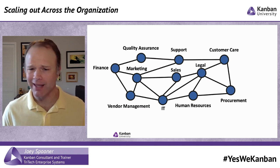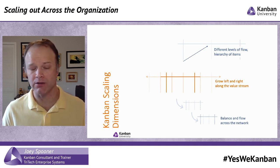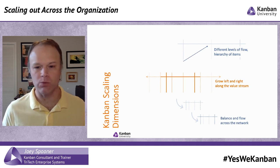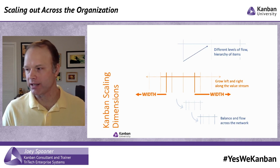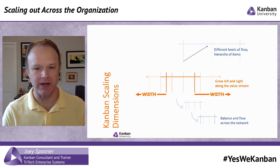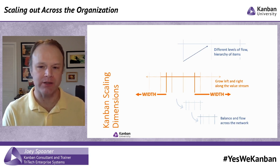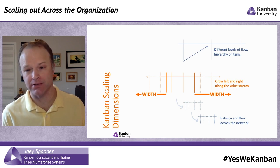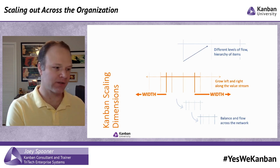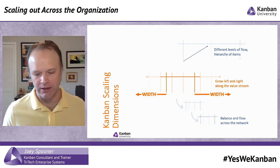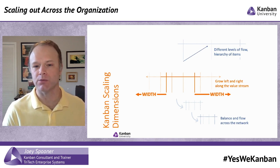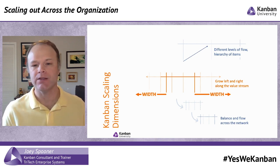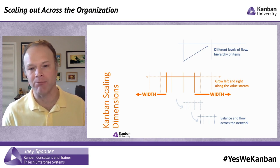Let's dive into this a little bit further — how do you scale this inside a business? There's no one wrong or right way to do Kanban inside of business. One option is you can go horizontally from the width of the actual value stream. One organization I recently worked with had a COBOL team and a new web development team blended together, forming the middle of that width diagram. They were providing a service to multiple agencies inside their business. After about six weeks of time, they realized they needed to go left — meaning go upstream, up the value stream closer to the customer. They started realizing that what the customer was giving them was very simplistic requirements, and more information was really needed to make it smoother.